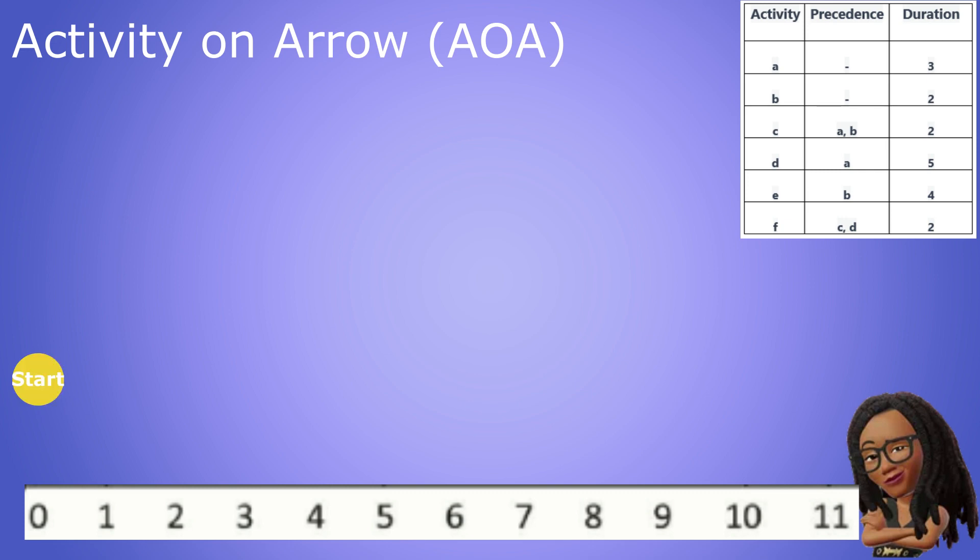First we draw our start node. We know A and B are the starting activities so we draw arrows from the start node to represent both of them. Activity A is three days long so using our timeline we draw an arrow three days in length and terminate it with a node. We do the same for activity B which is two days long.